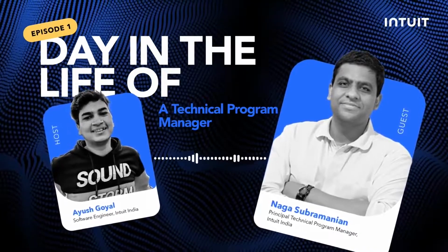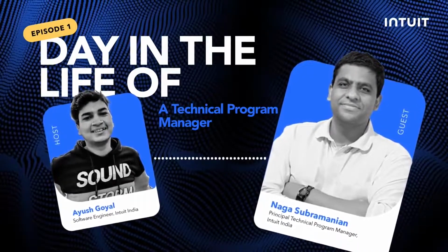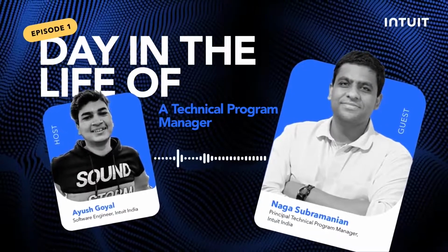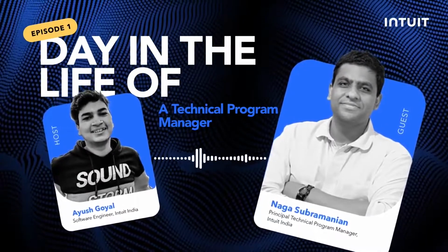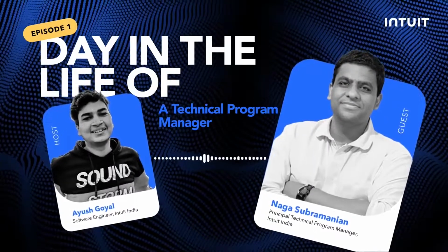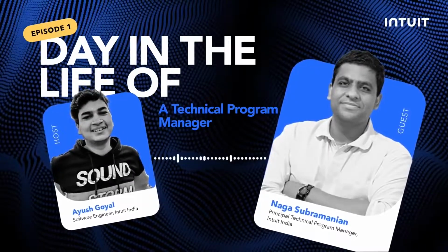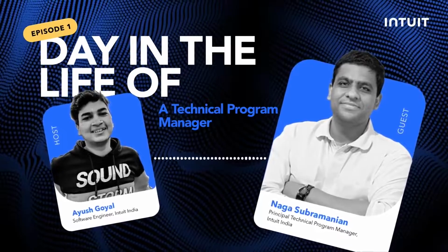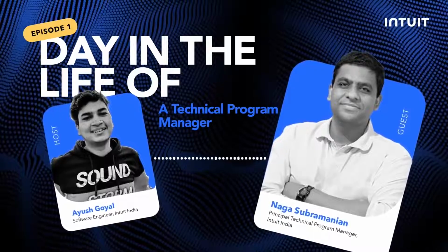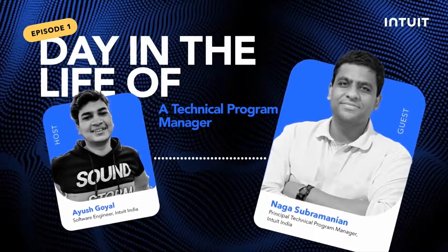Okay. So my next question is, as you mentioned, you have worked with multiple projects at a single point of time. So how do you collaborate with cross-functional teams and stakeholders to ensure successful program delivery? Yeah, the key thing here is you can't manage what you don't know. So everything starts from knowing them. In the early parts of the program itself, we think about it along with others. It's not one man's job. So we discuss and say, okay, who are all the teams we have to work with? Who are all dependent on us? Who are all we are dependent on? And who are our stakeholders?